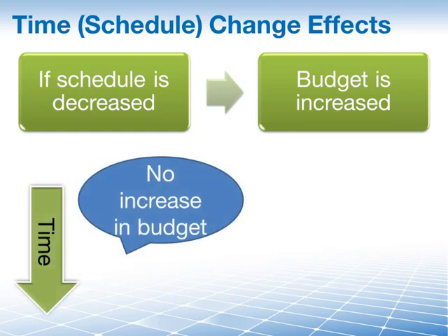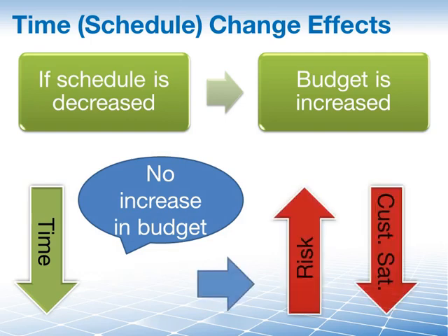But if you decide not to increase the budget, even though your schedule has been decreased, then this may increase the amount of risk on the project in terms of inferior quality products being delivered, not meeting the new schedule deadline. And all of this, by the way, could also result in decreased customer satisfaction.